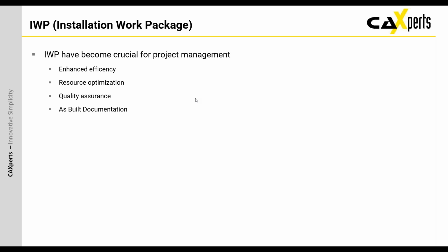All of these were mostly for the construction phase, but we also have as-built documentation that is generated during the process. With this as-built configuration, we have a lot of documents that record when something was installed, where it was installed, and what was installed. And this is very valuable for future maintenance, repairs, and modifications to the infrastructure. It also helps in asset management and facilitates maintenance and compliance with regulatory requirements.